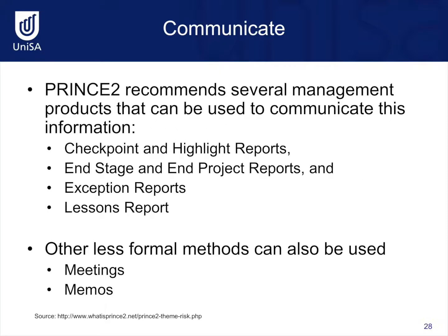There are a number of strategies available to communicate risk information. PRINCE2 recommends several management products called checkpoint and highlight reports, end stage and end project reports, exception reports, and a lessons report. Some less formal methods can also be used to communicate risks, including meetings and memos.